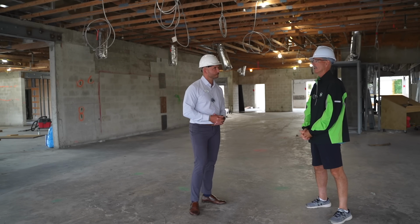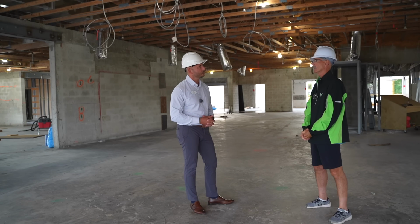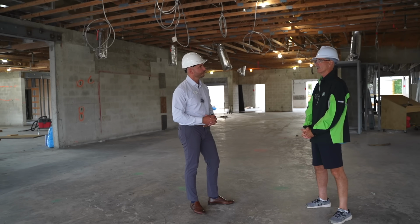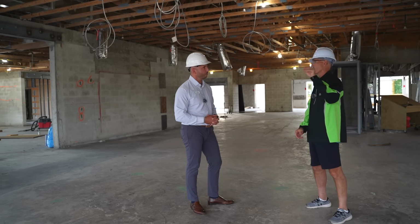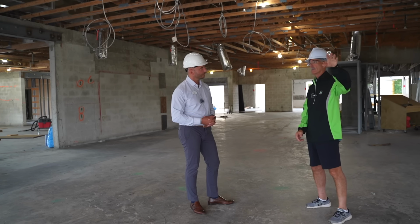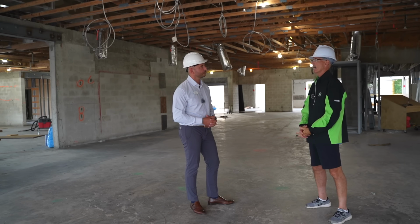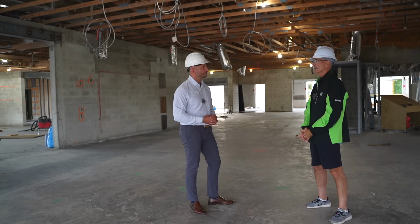The pool, I think I misspoke in one of these. It does look like December, January, February for the pool. So they're basically going to back their way out of the site work. Right. So we'll get some patio work and maybe even some planting roughed in. And as they back out to the south through the new parking lot, they'll do the pool. Makes sense. It's a big job.